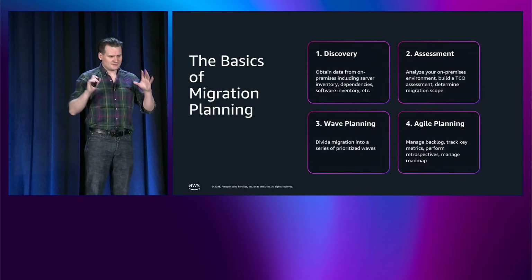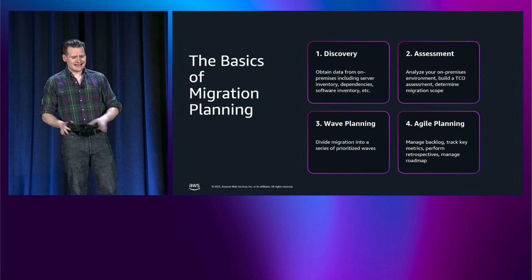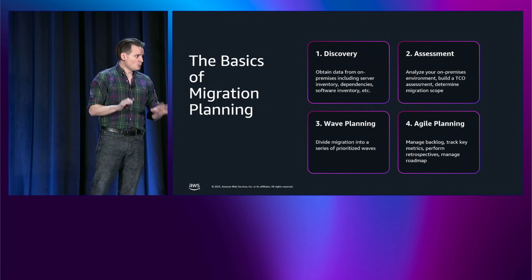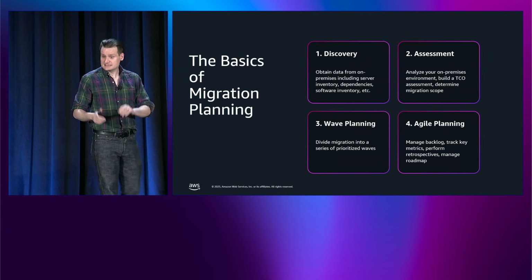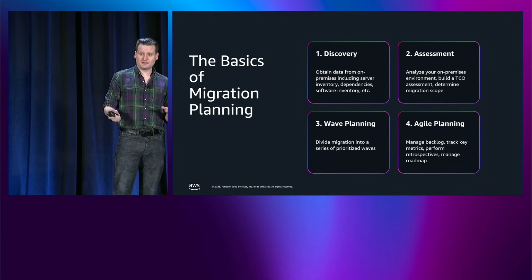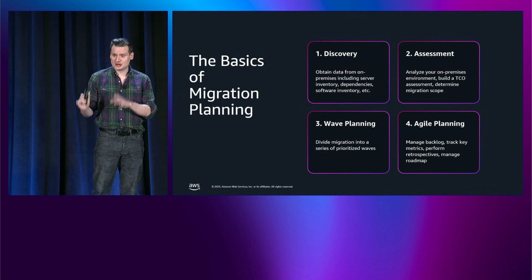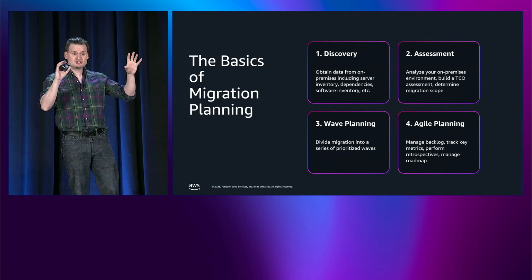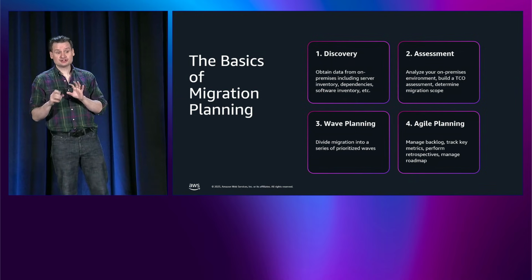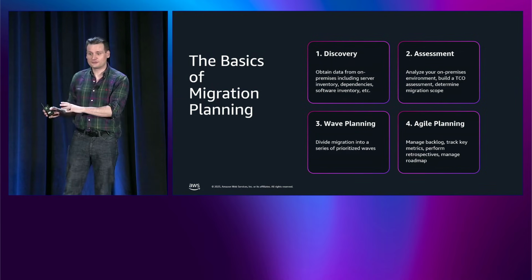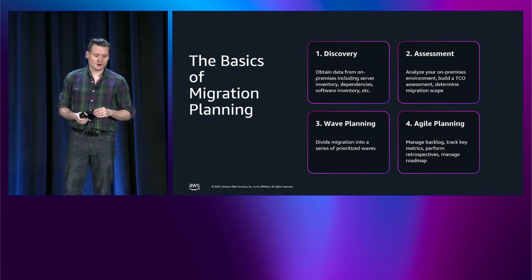Now, once you have an initial set of discovery data, it then becomes a case of assessments. Assessment can mean many things. We'll get into that a little bit more, but what typically an assessment means is TCO assessment, total cost of ownership assessment, ultimately providing the financial basis for your migrations, working out what the current state is on premises and what the cost will be on AWS, and not just the pure cost, but the optimized cost, so how you ensure that you are managing your costs and realizing cost savings as part of the migration.